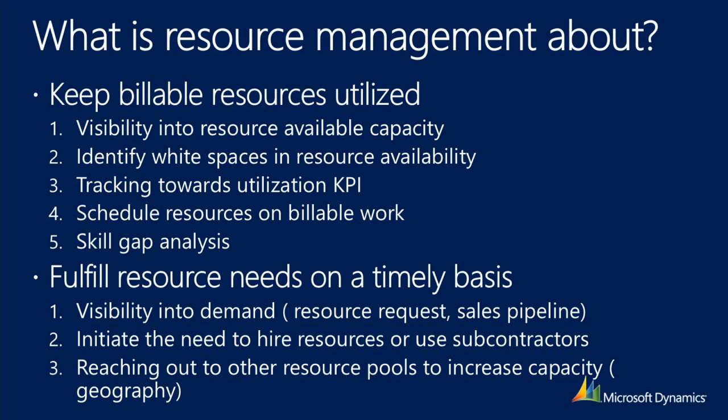When a resource manager, again, I focus on the resource management function, looks across your organization at opportunities that are coming and the likelihood of an opportunity to go, you can translate it into potential resource needs. Again, resource means people or machinery and equipment. It will be a good proactive approach to understand that, and then either make a call on using subcontractors, if that's not an expertise that you want to build in your organization, you want to just outsource it, or you want to hire people.